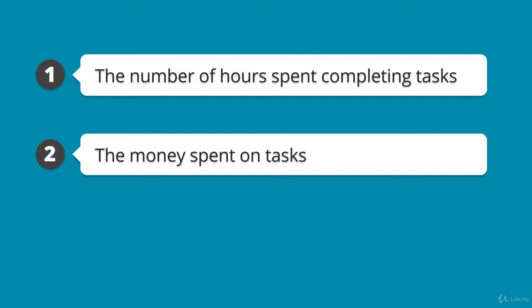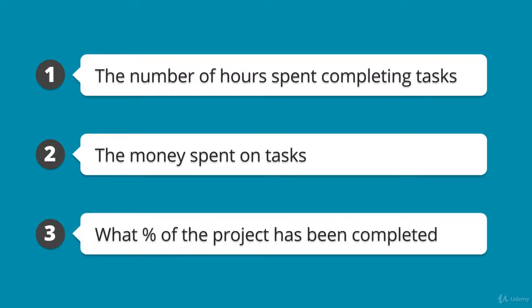It can also help to see what percentage of the project has been completed so far. This helps provide some context for the other KPIs, although it's not something you'd maybe directly track, because it obviously goes forward. You'd use that in conjunction with, say, time or money. For example, if you've spent all of your budgeted money, it's not really a problem if you're 95% done with the project, but it would be cause for alarm if you're only, say, 25% done.